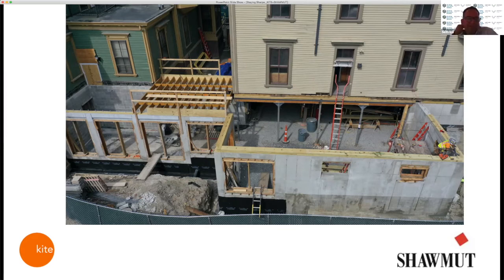Sure. Christine, this is Seth. I was actually one of the project managers for moving Peter Green when I was at Brown. No kidding. Oh, so you could have told us some things. Well, I was more cleanup crew. Peter Green looked great when they moved it, all the plaster was still in place, and it arrived in good condition. But nobody knew there were two layers of sheetrock with very little purchase up to the lath on that. What was connecting that, and the move and the introduction of new HVAC into the building, loosened a lot of things up.